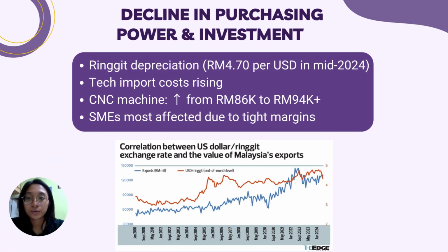Another major issue is the decline in the real value of capital investment. As the value of the Malaysian ringgit drops, currently around RM4.70 to the US dollar, it becomes more expensive to import essential engineering equipment. For instance, a CNC machine tool that cost RM86,000 last year now exceeds RM94,000. This significantly impacts SMEs who often have tighter budgets and less flexibility.